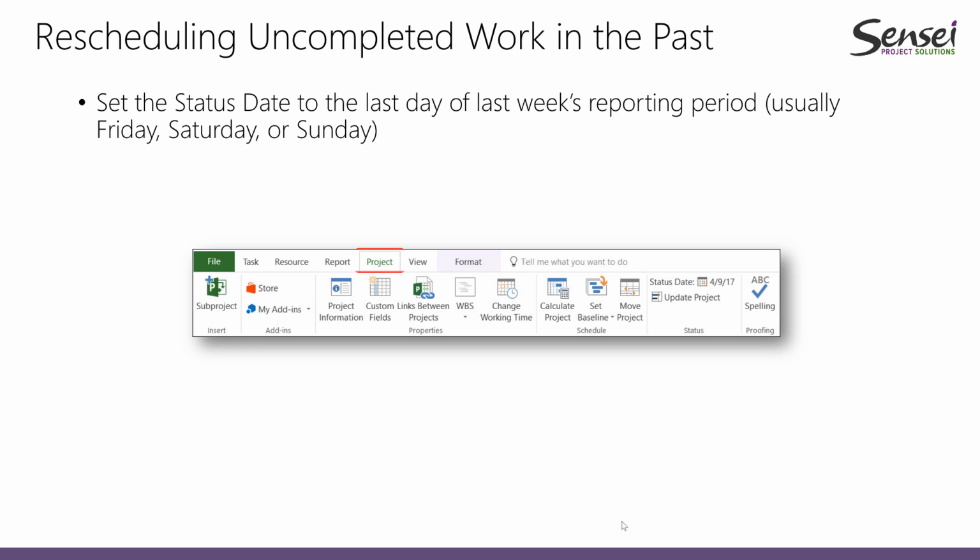So this is what we do. We go to project, and then we go to status date in the status area, and after that we can define, or we can set the status date for our project. So during this presentation, I will be just showing you what we can do, and I will be doing some quick demonstrations for us to understand how we do that.